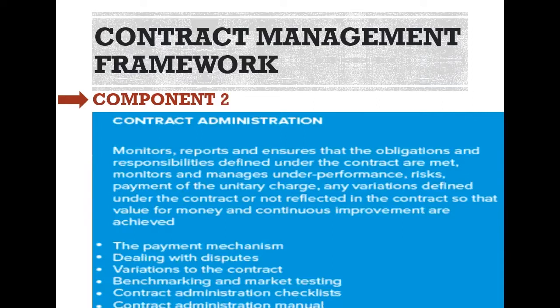Component two: Contract administration. This component monitors, reports, and ensures that the obligations and responsibilities defined under the contract are met. It monitors and manages underperformance, risk, payment of the unitary charge, and any variations defined under the contract to ensure that value for money and continuous improvements are achieved. Topics include: the payment mechanisms, dealing with disputes, variations to the contract, benchmarking and market testing, contract administration checklist, and contract administration manual.